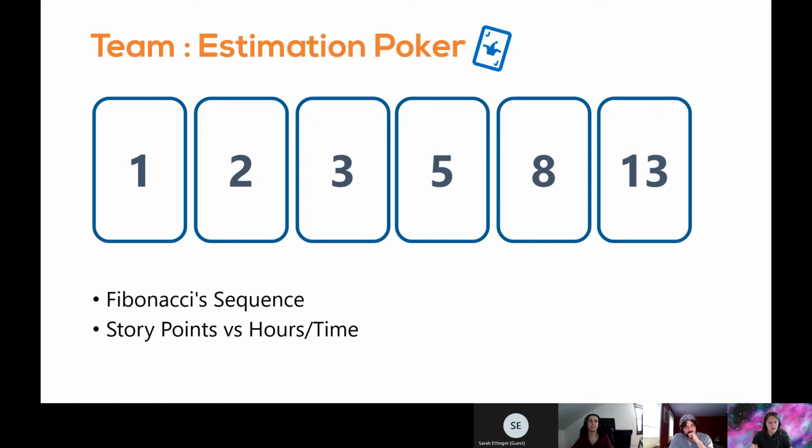If you have two or three people that are part of the project, they have some idea of how long it might take because they have experience rolling out Slack or some other system. You can all get on here and say, all right, how long is it going to take? 3, 2, 1. All right, so I think it's going to take 5 weeks to roll out, or 5 months, depending on what your measurement is.